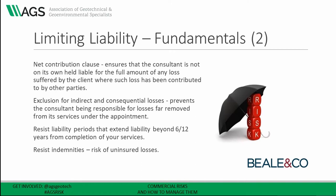Try to exclude liability for indirect and consequential losses. This prevents you from being responsible for losses which are far removed from your services. You might limit the types of loss to something that is foreseeable, or in some cases it might be the reasonable cost of remediation, for example.